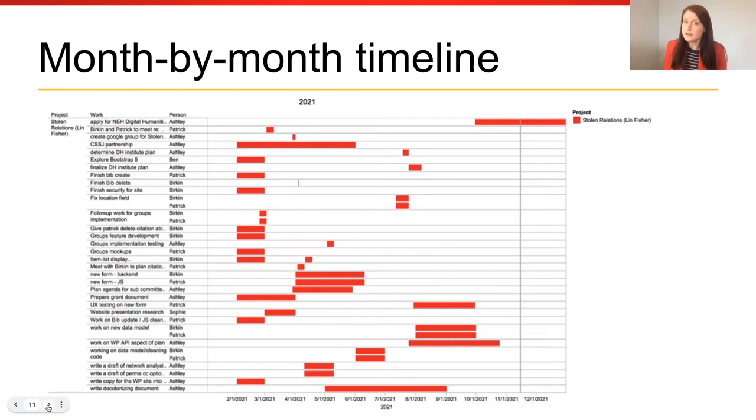While it is ideal to have an overarching timeline for the project and to think towards the project's end of life as much as possible, we found it helpful to chunk our work month by month in order to determine the workflow for that period of time. Our timelines for customized projects, or as we call them, signature projects, are therefore quite specific. For example, in a given month, we might list what JavaScript library we're researching or what part of the project's input form we're investigating.